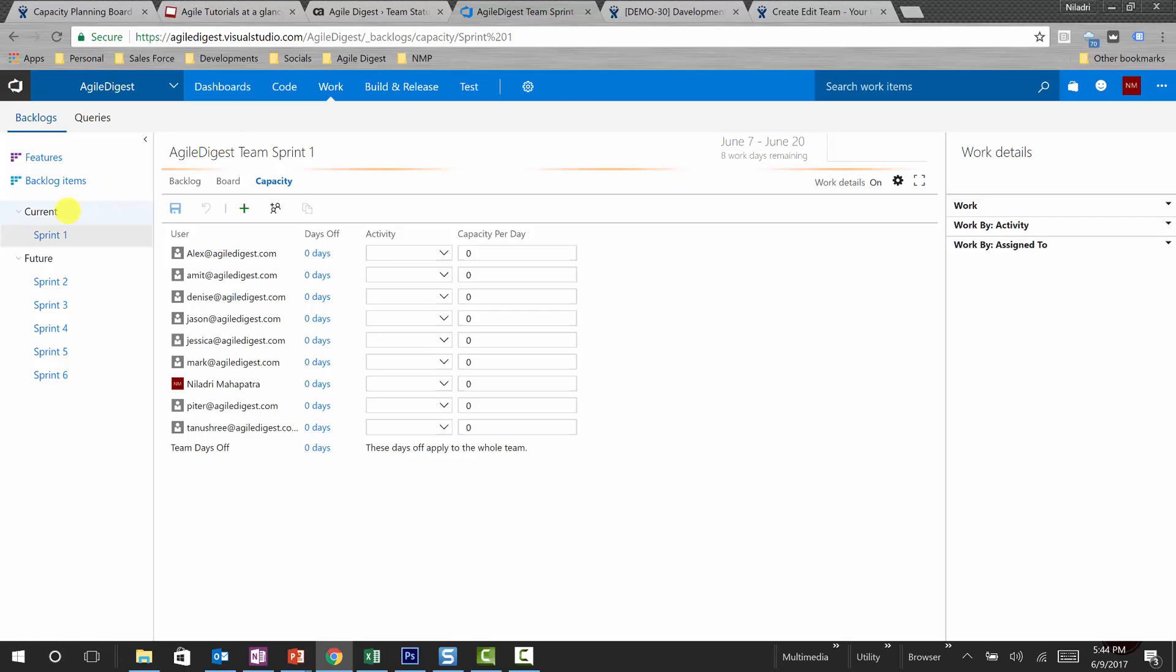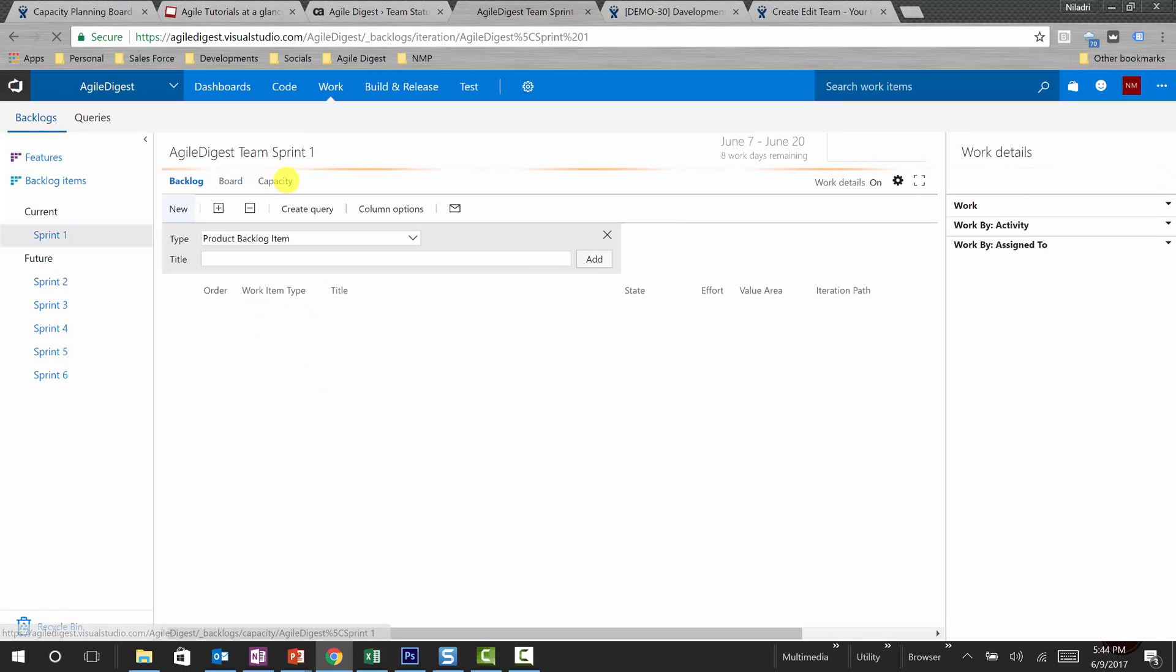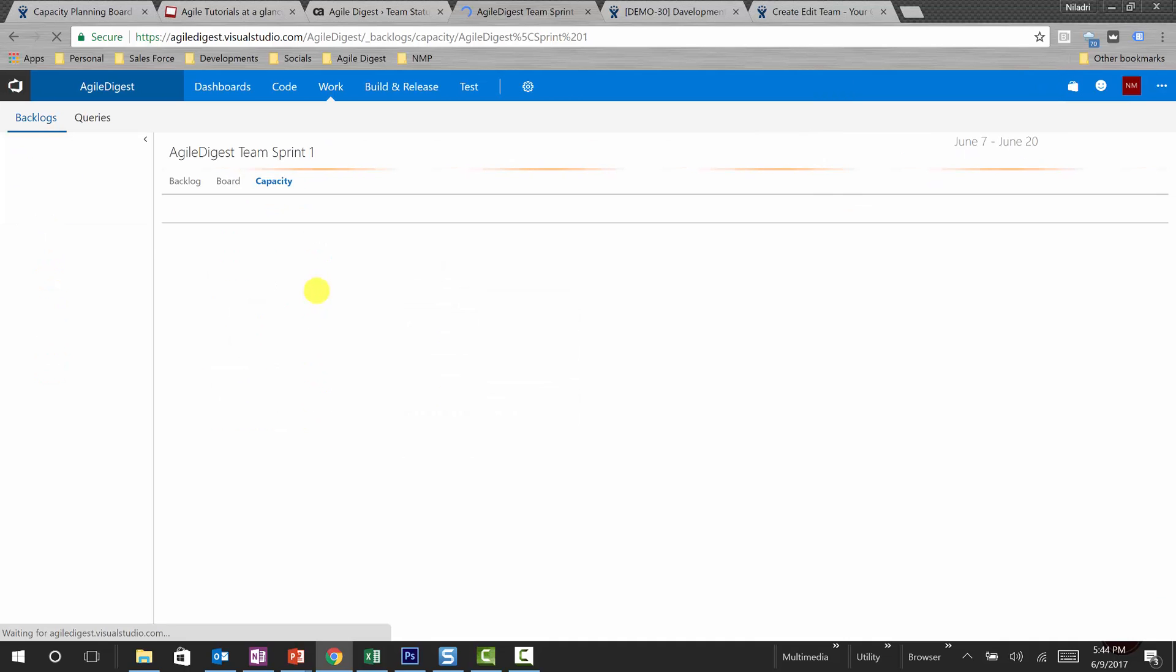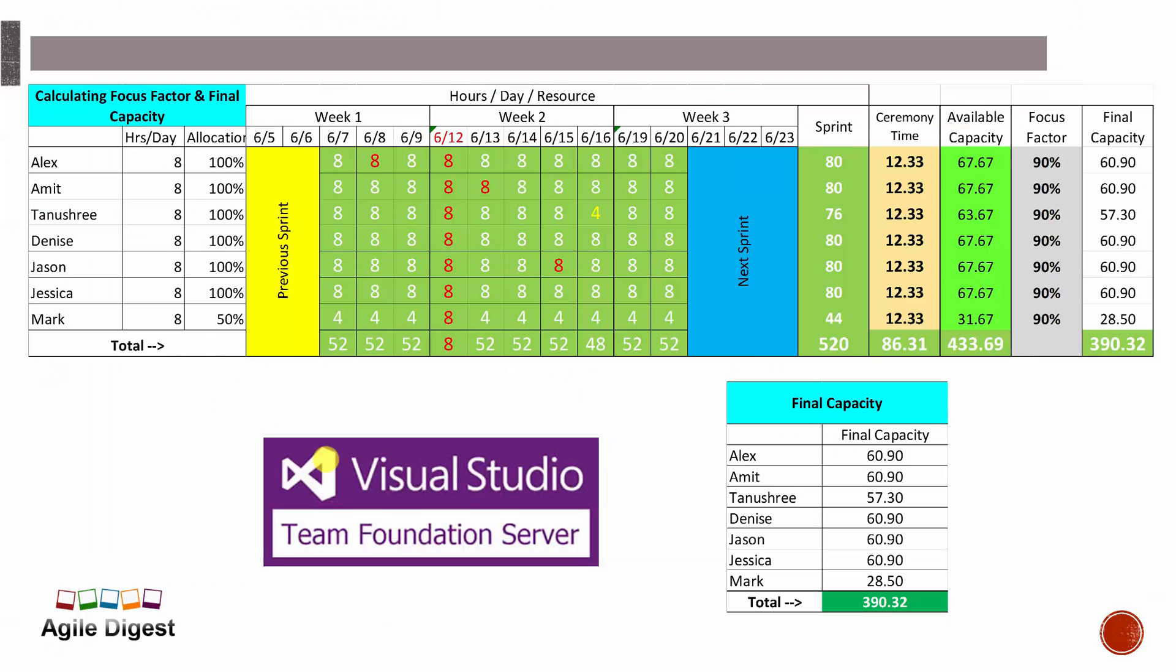So here we are in TFS. In TFS we can see this is our dashboard, we'll be going to work. We know that capacity planning always works under sprint, so we'll be selecting our current sprint or any sprint that you are targeting to do the capacity. This is your capacity. You click on it. By default it used to be on backlog, but you can click on capacity to plan your capacity.